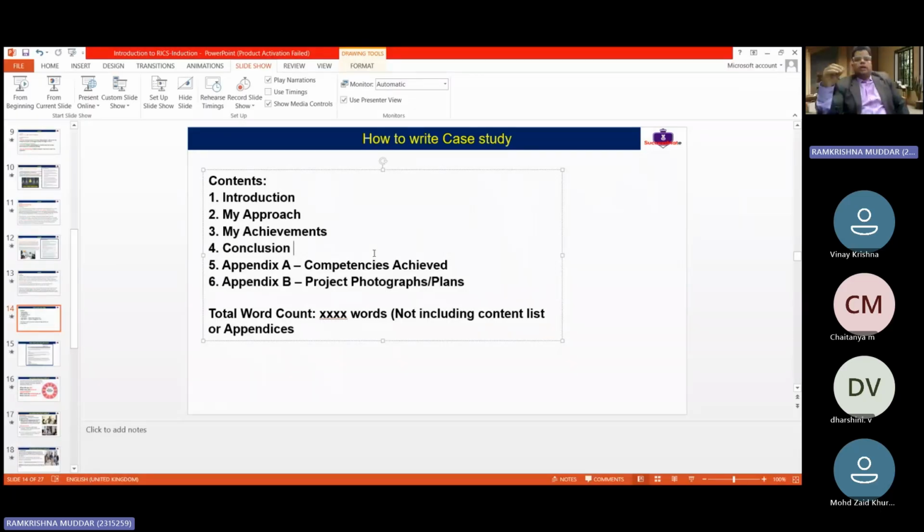So now you, as a hero, have to give a solution to the management on how you resolve these key issues. Okay, so you got a key issue: there is an escalated rate which is affecting the concrete project budget. And if we are not resolving these key issues, then the project is going to be delayed, because the contractor is saying that until and unless his rate is approved, he is not going to supply the concrete for you.